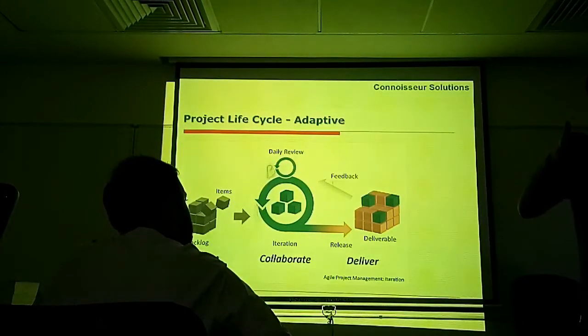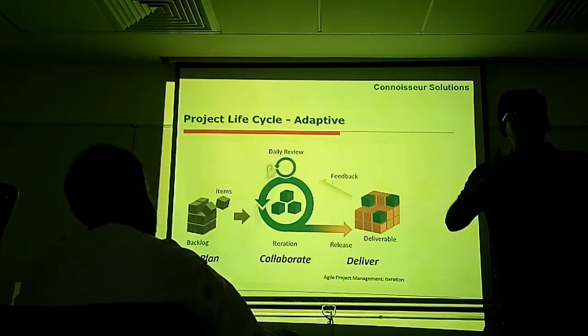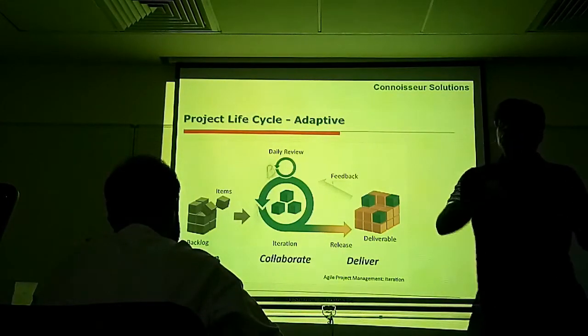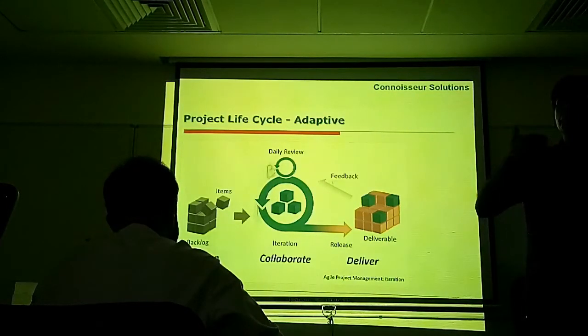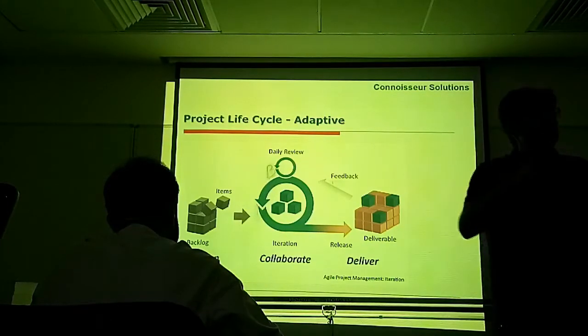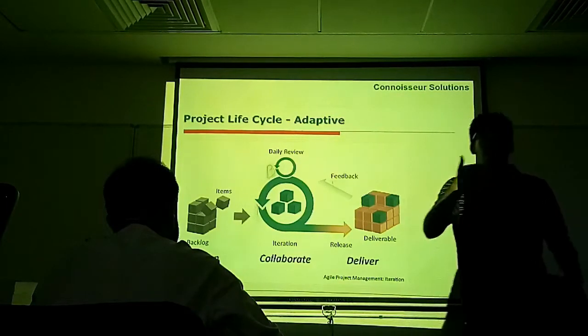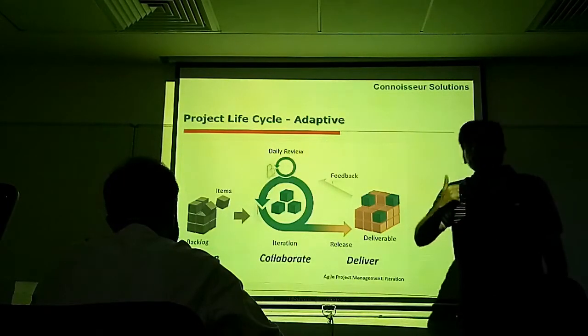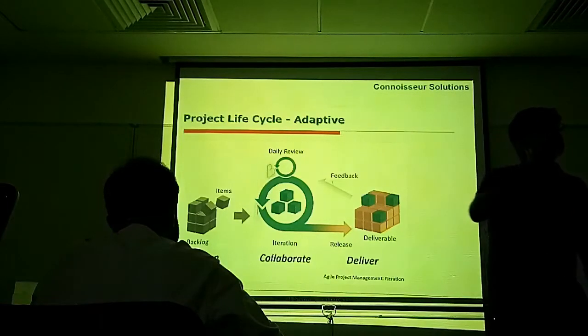Now, what you do in adaptive is you decompose the phases further into short, short iterations. And each iteration can vary from 2 to 4 weeks. Phases are further divided into small iterations of 2 to 4 weeks. And each iteration is called as sprint.